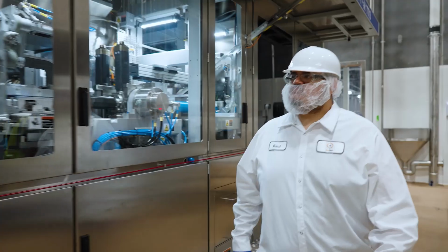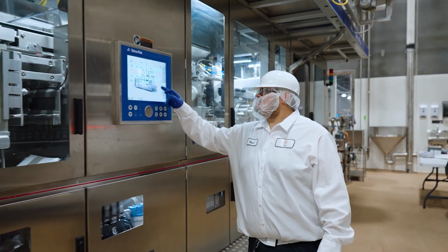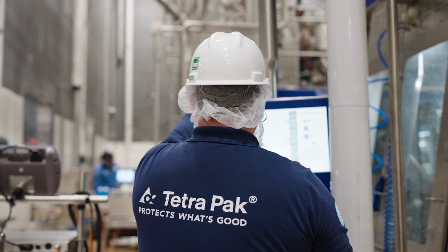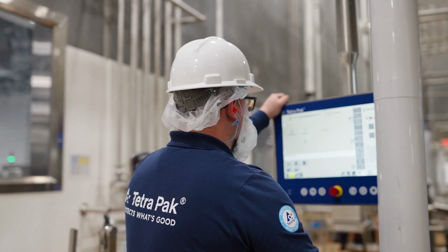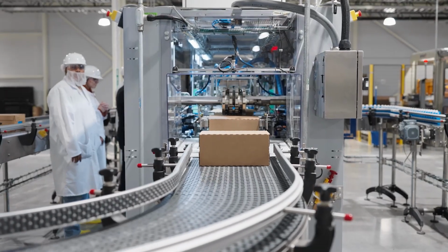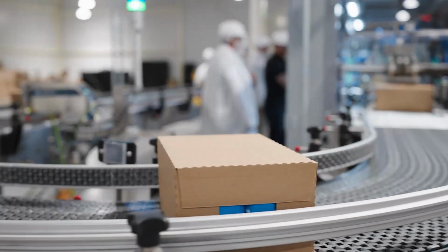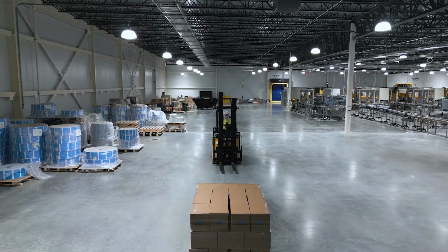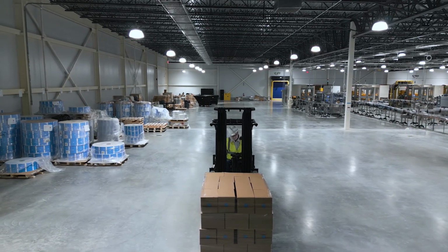And then there was a very stringent position from day one to go into the digital model and update your stuff. And if you don't update it, then you won't be part of the next phase 2 and phase 3. There was a line drawn in the sand that this was the expectation. And luckily, all of our partners in the process went in and did what they were supposed to do so we could troubleshoot before we even started to bring pipe in and put pipe in. But we had things that came up and we've overcome them.